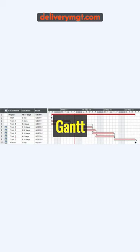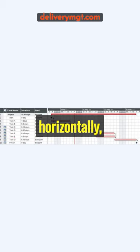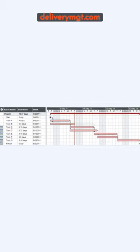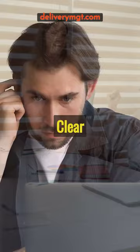Gantt Charts plot time horizontally, list tasks vertically, and use bars to show task duration and scheduling. Milestones are represented by shapes like triangles or diamonds. Clear Gantt Charts with a key for symbols are important for easy understanding.